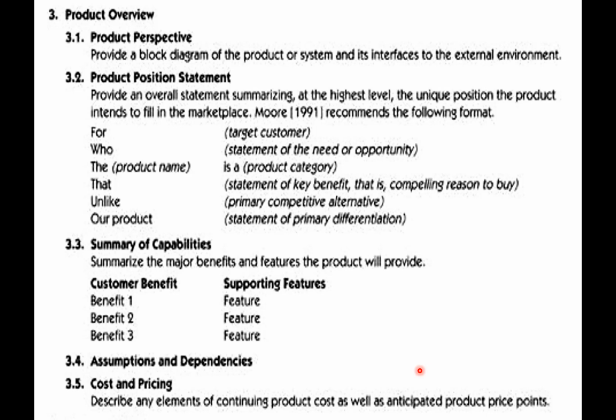So you'll see that the vision document tends to begin before the actual project begins, and you don't want to spend that much time or effort on it, because you're using it as a basis, other than agreement, for deciding whether you're going to go ahead with the project or not. Now, if you spend 8 months doing it and realize you don't want to do that project, so good news, bad news. The good news is we didn't spend our time doing a project that we don't want. But the bad news is we already spent 8 months of work coming to this realization. So it's got to be quick and dirty, and maybe no more than 2 weeks before this vision document is established.